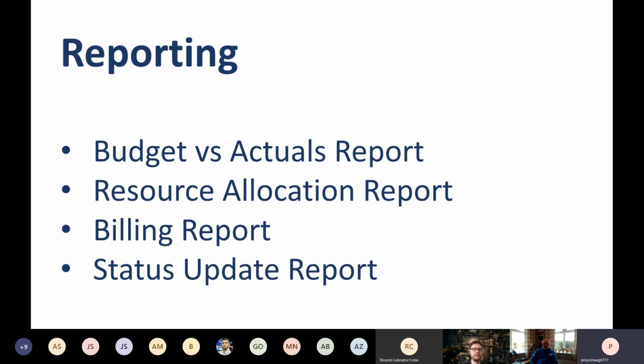Invoicing is pretty complex, and there are many angles to it. Even time and material, all the approved time entries will add up. If there are any extra costs, those will be added up as well. But let's say I get asked this common question about what will happen if I have a fixed bid project, and I want to do some extra time and material kind of work in that as well. So usually the answer is go ahead and create a separate project, which is an extra, which is of type time and material, so as to not clutter everything, trying to keep the records less.